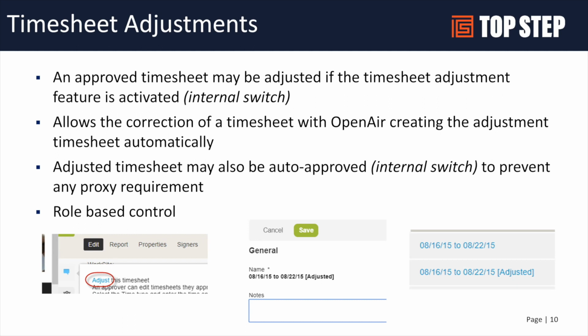So generally we see someone on the accounting side or operational side having the responsibility for doing this adjustment. And because it's an adjustment generally to affect either costing on a project or billing, it does not require additional approval, and you can go in and make the change and then rerun your billing rules, and you will pick up the new hours you've moved, as well as you'll reverse the hours out from the project that was potentially chosen incorrectly. So super cool, super easy, makes life a lot easier, especially for T&M billing customers.